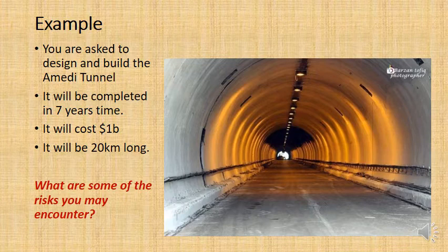They've just finished doing the Peramam Tunnel, the Massif Tunnel, and this will be the next tunnel on the big plan. Now, with a project like this, building tunnels, it's a very slow process of digging a tunnel, I'll have to say. So they're planning that this project, the design and the build of it, is going to be about 7 years. And it's also very high cost. Tunnels cost a lot of money to build. It's going to cost around $1 billion. So this gives you some idea of the time, cost and quality of this project.